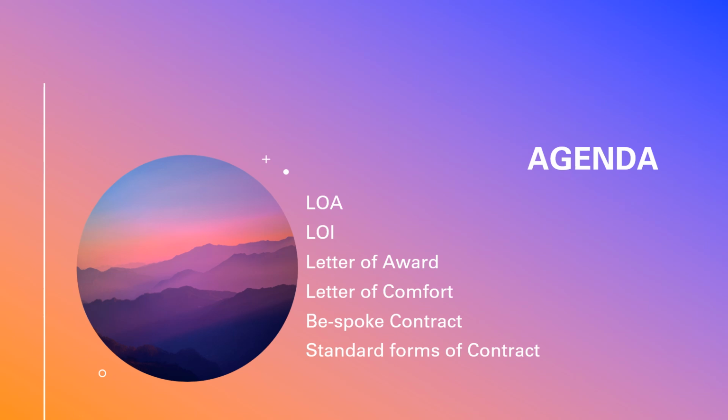For example, employer claims under 2.5, delay in issuing drawings. He will put some 30 days extra, 15 days extra. For notice of claim, he will require the contractor to give notice within 6 days. He will change the suspension clauses, the termination clauses, and possession of site.